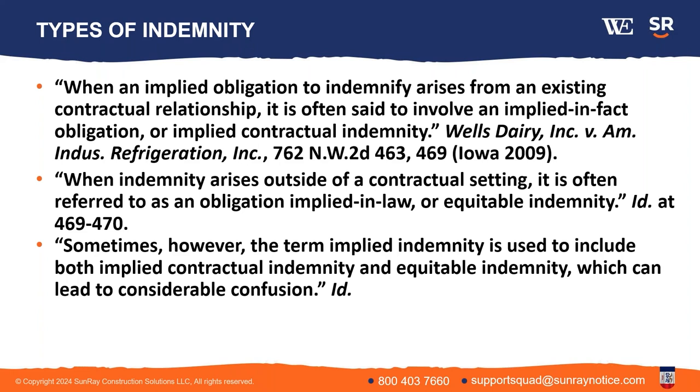But there's also implied indemnity obligations. And here's a discussion by the Iowa Supreme Court about a couple of different main areas of implied indemnity. You can have an implied obligation based on contract. So even if your contract does not have a standalone indemnity provision that explicitly requires indemnity, you can still have a contractual implied obligation to indemnify. And it kind of depends on what your obligations are under the contract. So that's one main area.